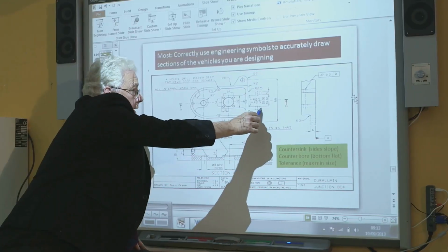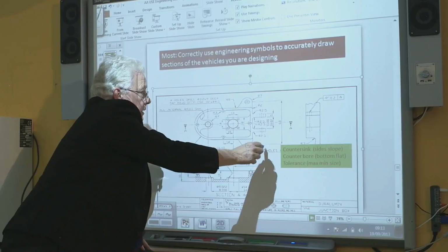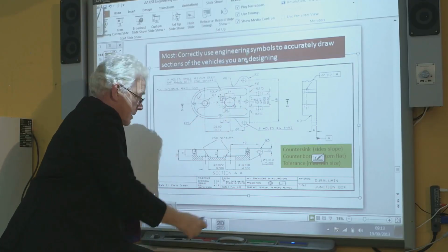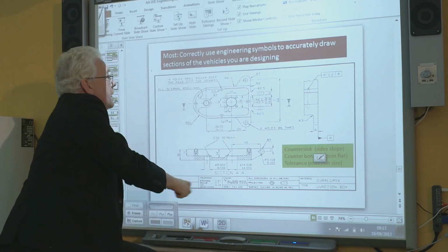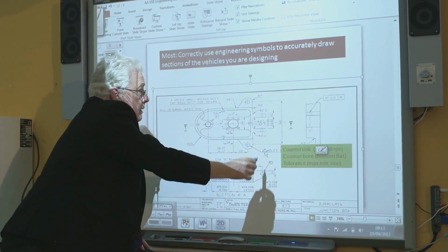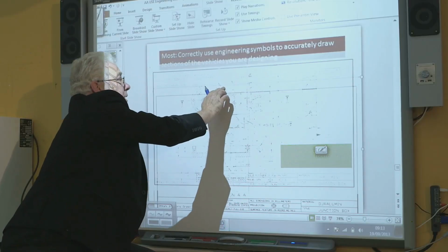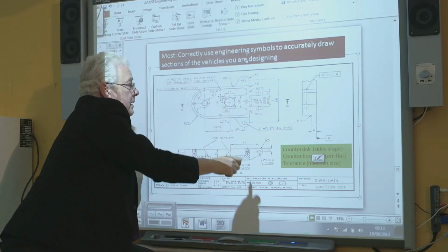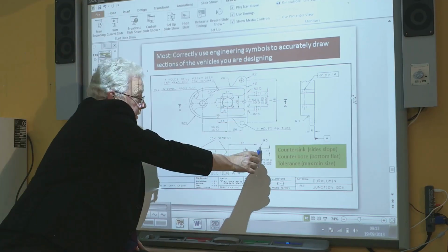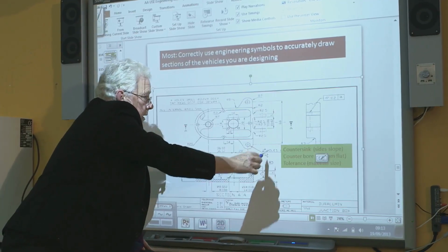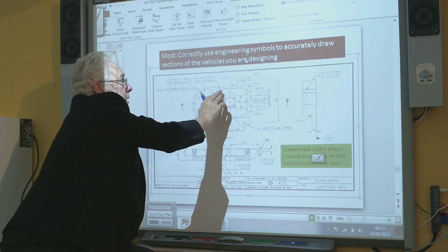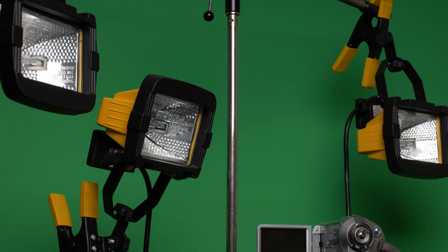Every professional budget is organized around 2 fundamental categories: above the line and below the line. Above the line covers your creative costs: writers, directors, producers, and principal cast. These are the people who create and shape your story. Below the line covers your production costs: crew salaries, equipment rentals, locations, and post-production. These are the technical and logistical elements that make your story a reality.